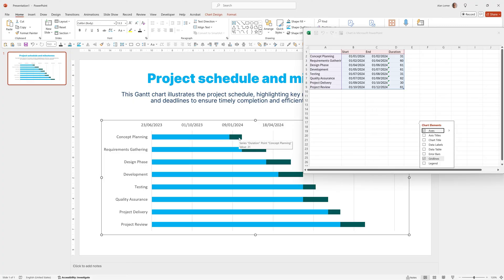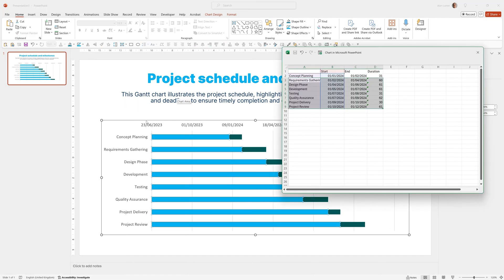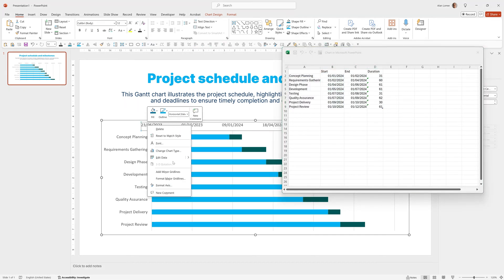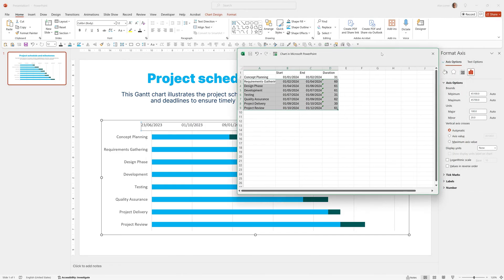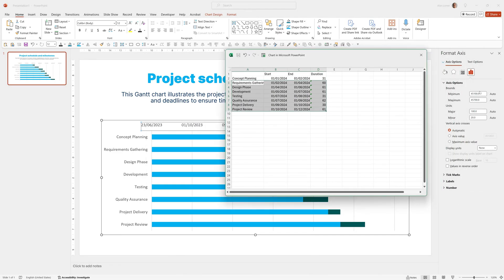The main content of the Gantt chart will be these green blocks — these are the duration. In the end we won't be displaying the blue ones, and we want the green bars to start over the left and finish without extra space. To do that we click on the dates, right-click, choose Format Axis. You can see from the axis options there's a minimum and a maximum, but not in date format — just in a numerical format.